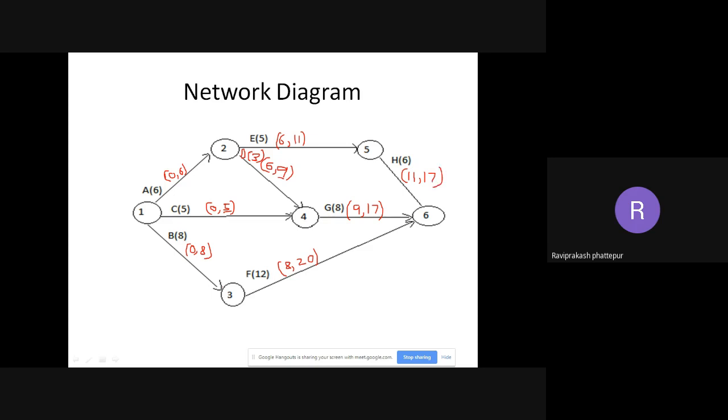Okay. So if you see, three arrows are coming and meeting here. First one is 17 here. Second one is also 17. Third one is 20. So always the duration will be the maximum that you take, the maximum that comes and reaches the last node. So in this case, it is 20. So your duration is always 20. The maximum time that is coming and reaching the last point will be my duration. So in this case it is 20 and two 17s are there.